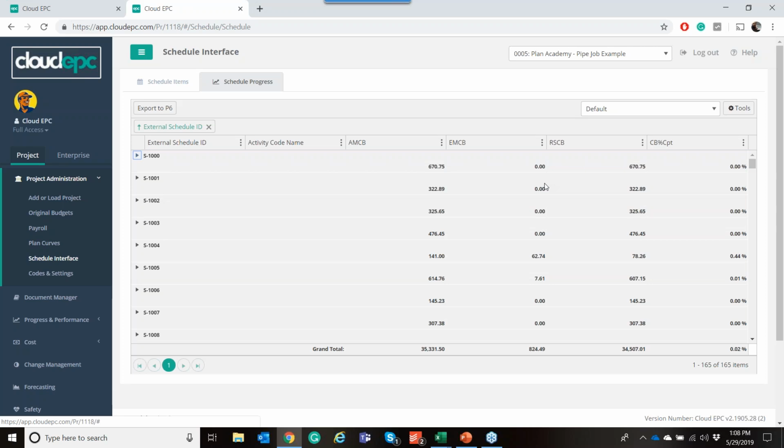I think you're absolutely right. If you're planning down to the hour, you're close enough between 0 and 100 just entering a physical percent complete based on expert judgment, because by the time you get through validating units on that one, you're already on to the next task. So I would probably agree with that statement, in a long-winded answer. At the same time, in turnarounds, there's a lot of small tasks that, as you said, are either not started or done probably.